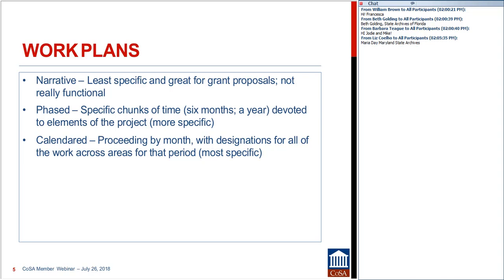And what that means is that you would describe the sum total work for that phase and how it will be done, and assume that the phases move forward in a kind of logical order. That's not to say that a phased work plan might not have elements that are proceeding concurrently, but the idea is that the work has been chunked into logical divisions that are not necessarily driven by product, but maybe by kind of work.